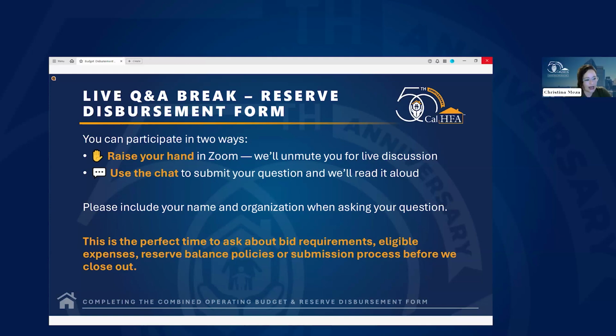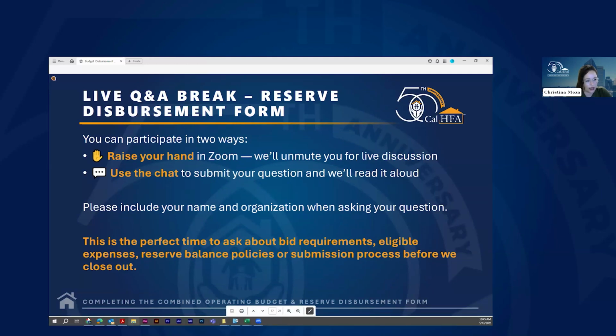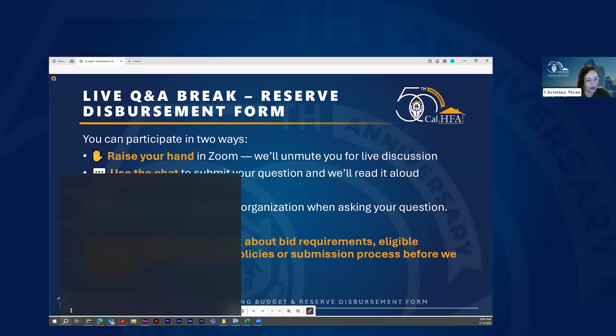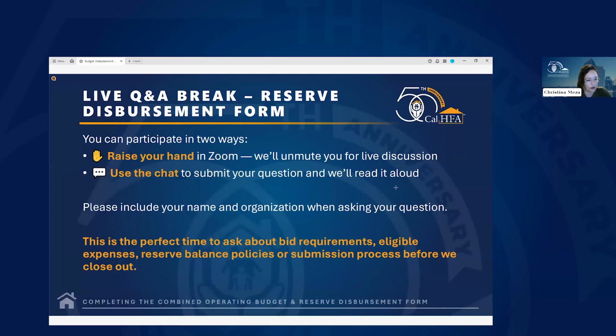So let me just ask you this question, Diego, and you can respond in the chat. When you say designated item for request for funding for one particular item, is it just for emergencies? Because emergencies are handled differently. Bids are only required if it's a planned improvement or replacement. If it's an emergency, there's always exceptions on the emergency.